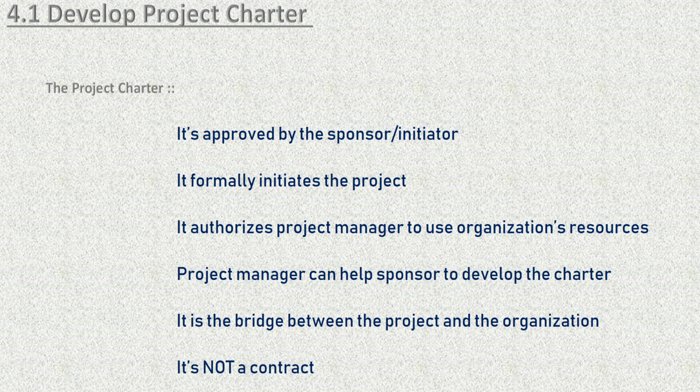So the main criterion for a project being initiated is that the project charter has to be formally approved. It authorizes the project manager to use the organization's resources.